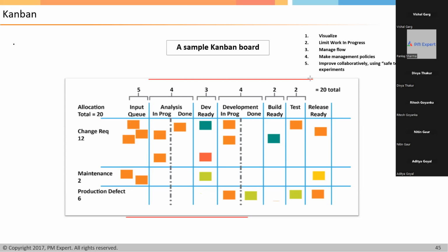Yes or no? Can you note down the average time for multiple items? Take it for every item, then take the average of it. Average cycle time, basically. Because cycle time is always an average, as items move from here to the end, they will not have the same cycle time. But yes, you can measure an average cycle time for a WIP. Are you getting my point?